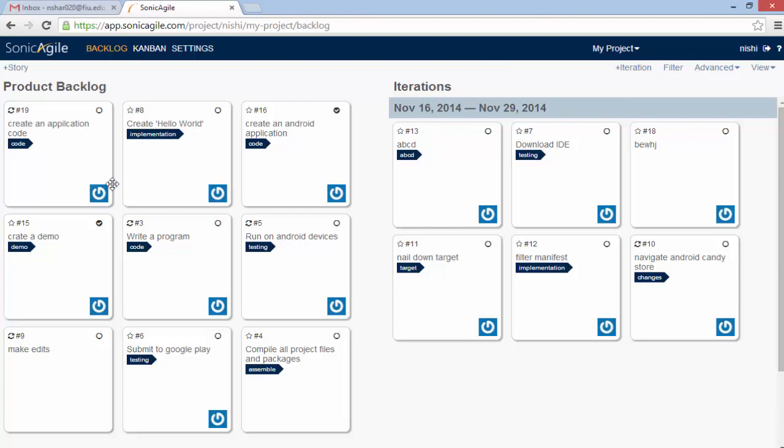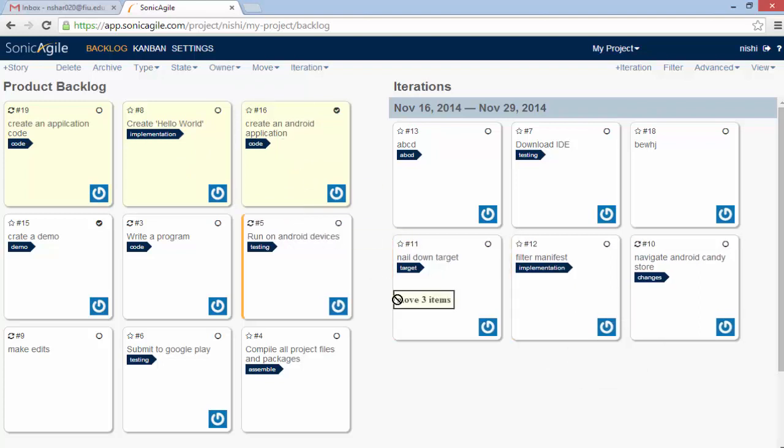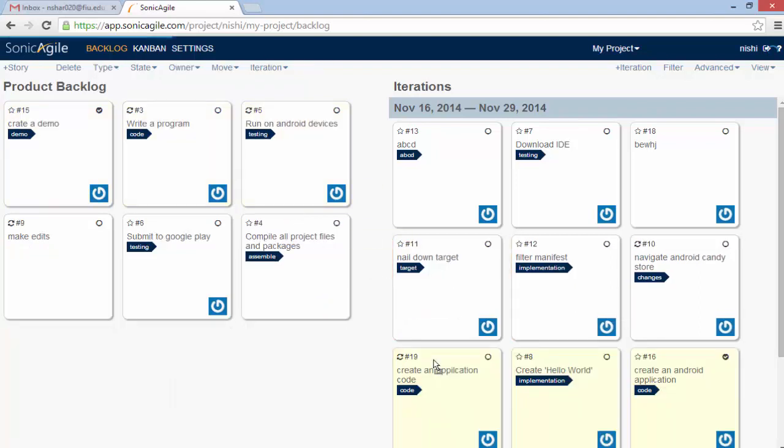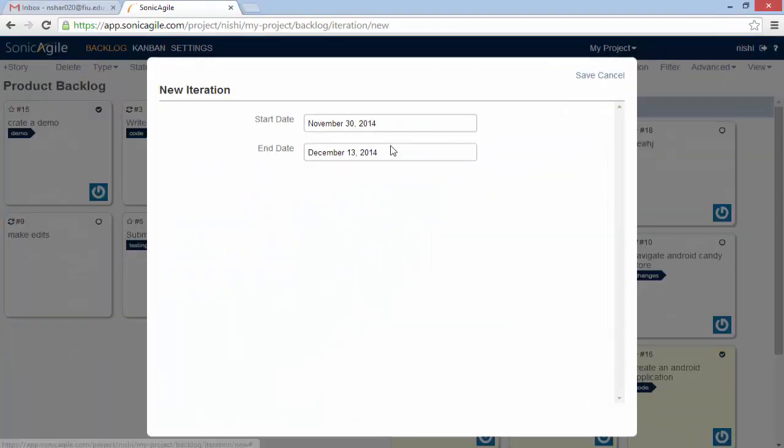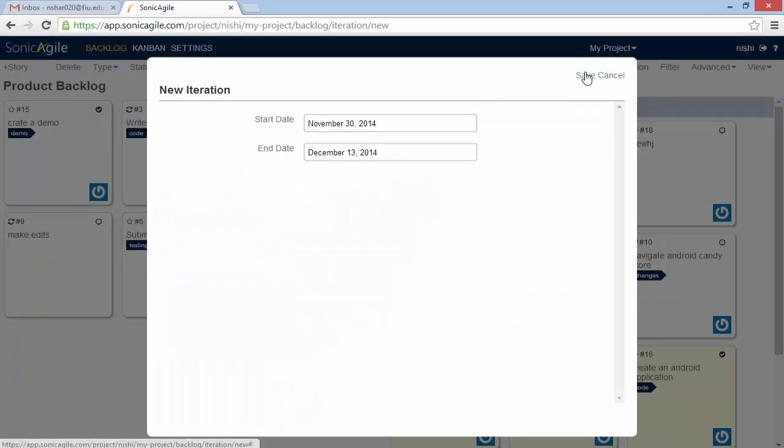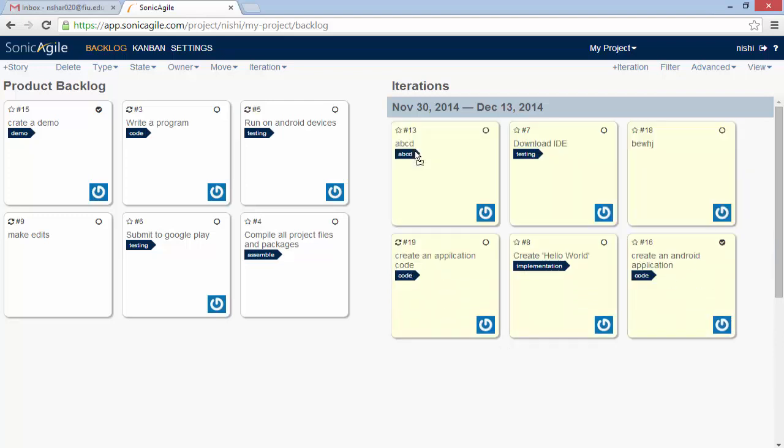I am going to move three stories at the top of my product backlog into a sprint like this. You can drag it here and your stories will be accounted in this. So you can create new iteration also. You just need to enter the start date and the end date and then you can save it. So in this way, you can create as many iterations as you want. And this iteration story, you can drag it anywhere in your iteration box.